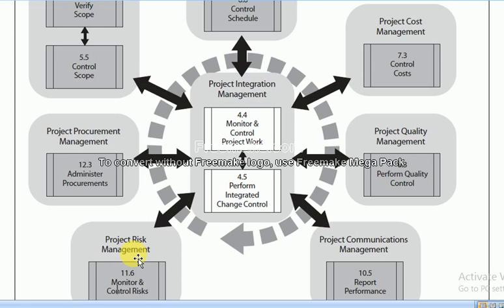I'm sure that I will finish this project in, let's suppose, $1 lakh. So instead of $1 lakh, I will give a budget of $1,05,000. Yeah, $1,10,000. Similarly, if I'm 100% sure that the project will be completed within 12 months, I will give 13 months of time duration. 1 month is a reserve.